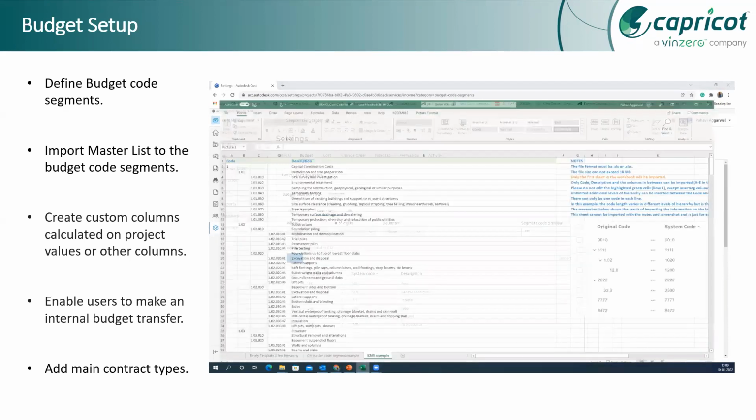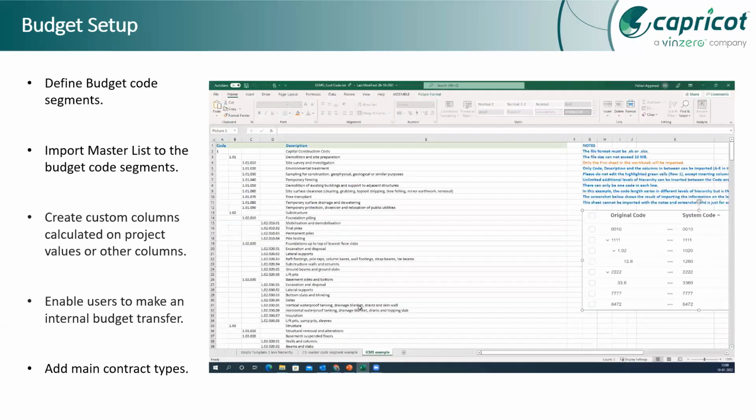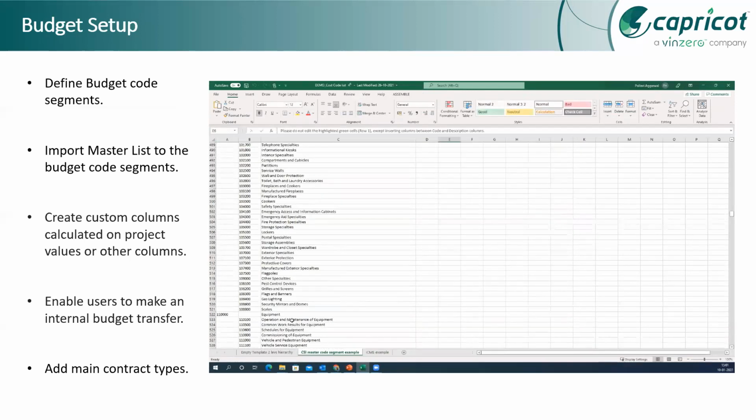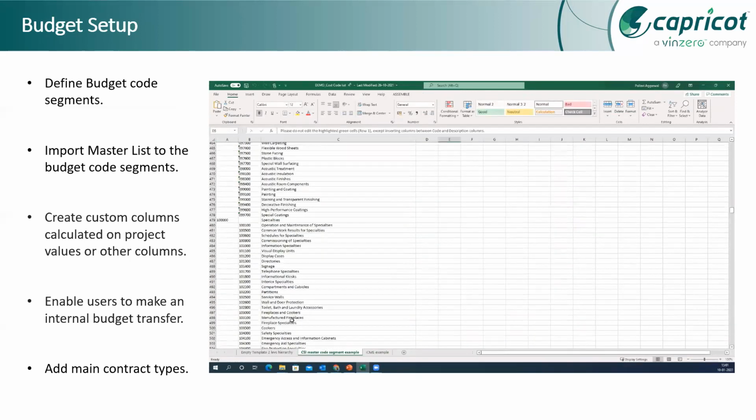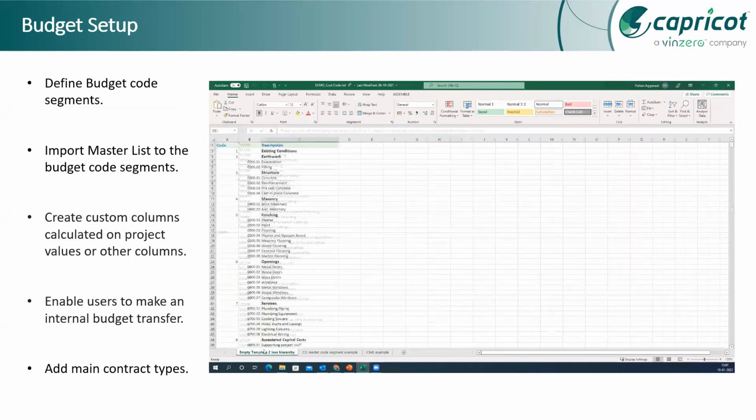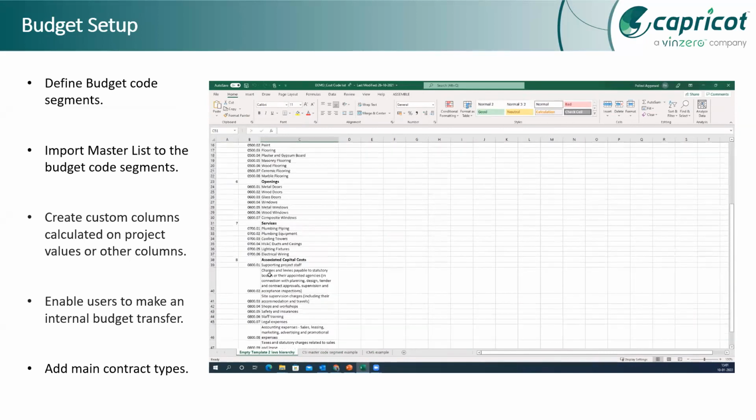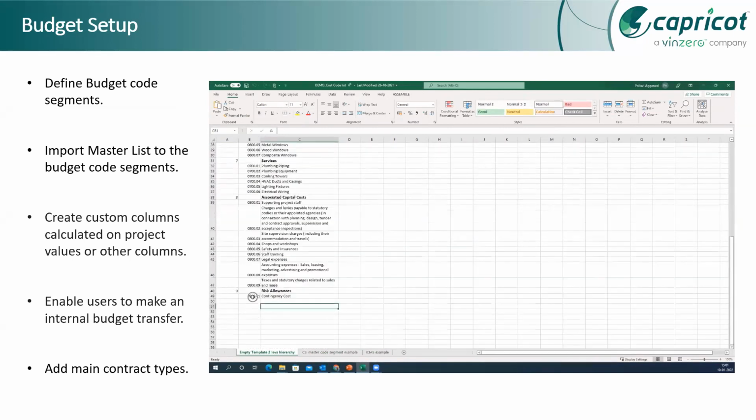Let's say the naming, a cost code, or your type of project, which can be housing or any commercial building, those names, and maybe internal, external. And even material-based, labor-based type of activity. All those segments coming together can create your budget code itself, which becomes readable in the platform once we start with the management of our cost.